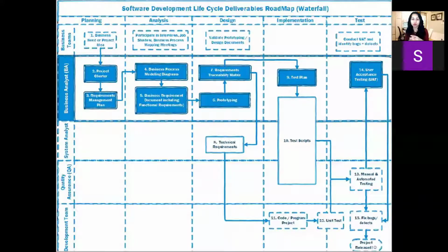It is to make sure that you have identified a plan for your stakeholders. So typically on a project, you'll have 5 or 6 key stakeholders, meaning that there are 5 or 6 departments using this tool, right? And so your test plan should include, how does department A, B, C, D, E, and F plan to test for this project? When will they be testing? How will they be testing? Will you be providing training for them?